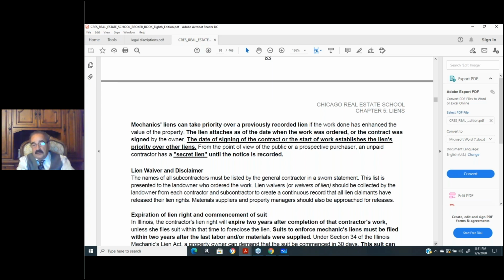So that's what a lien waiver is. Again, you never let go of that final payment, that check, until you have that lien waiver in the other hand. You don't pay off until you get that lien waiver. It's okay for the questions. I'm here to answer your questions.